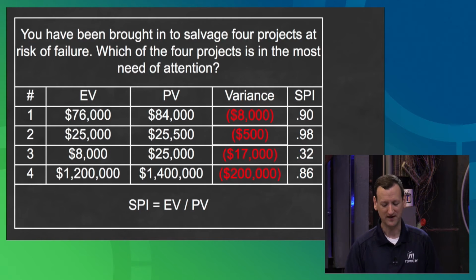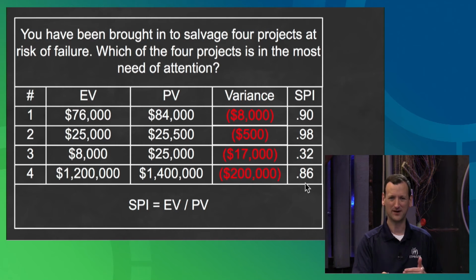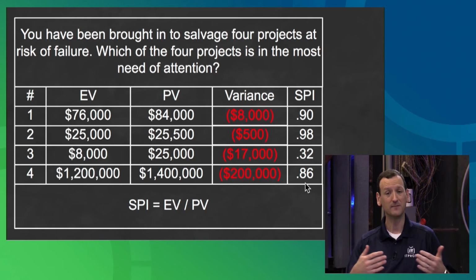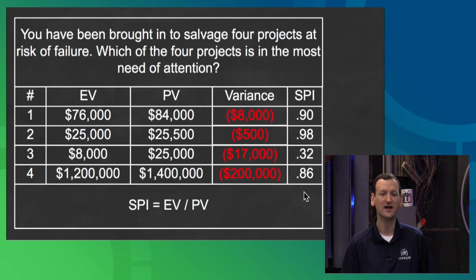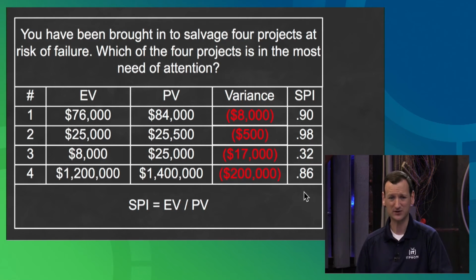than the other one. And SPI really makes it where we can compare these projects, where schedule variance is not easy to compare. Schedule variance is great for just looking at one project. But when you're comparing multiple projects, SPI, Schedule Performance Index, that's the one that really works out. And so on the exam, when they ask for an SPI, they might ask for it on a single project, but more commonly, it'll be something like this.